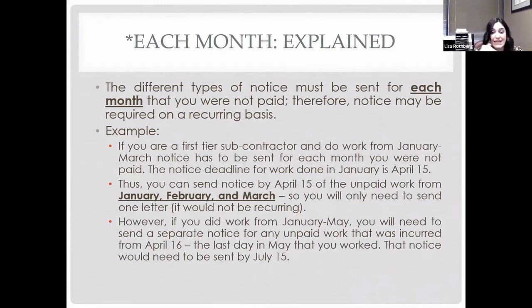So I think that this is an issue that a lot of people get kind of hung up on, and it is, I feel like, super confusing. And we file a lot of liens all over the country, and I would say that this is probably one of the most confusing things that I've seen, because people just don't realize that if they're working on a long project, they're going to have to continue to send recurring notices. So I just think everyone should sort of watch out for that. The nice part is that if your client's a general contractor, obviously you don't have to worry about it because general contractors don't have to send notice.